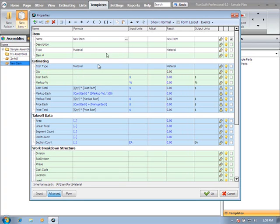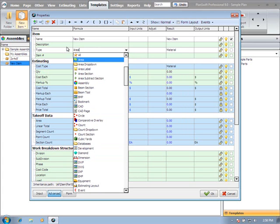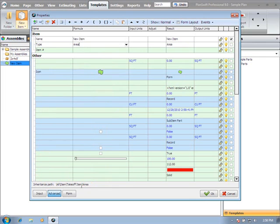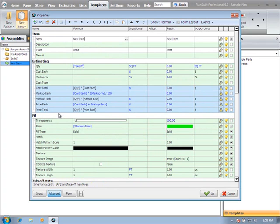So you can use your types to set what type of object you're creating. And again, like I indicated, material, equipment, labor, subcontract, and other are the default cost groups that the reports are using. So when you're creating your new templates based on the type as well - if you were going to create a new template, you would just type in area type. And you'll see you have all your area properties. Then you could add your own properties or edit the properties that are currently here to suit your needs.